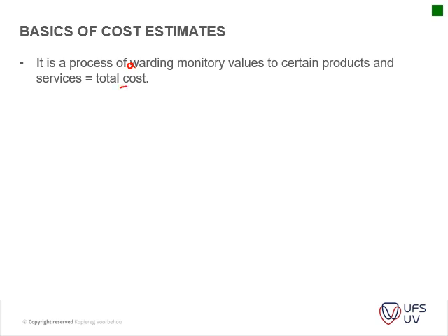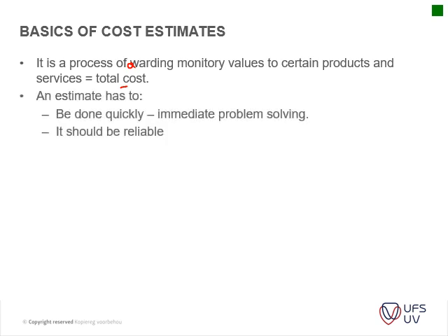Now, there are always additional costs that the client has to be aware of, like for instance the fees, VAT that has to be added, external works, payments of loans, etc. Usually payments of loans we're not too involved in, that is for the client, but there are establishment costs, connection fees to the municipality, etc., etc.